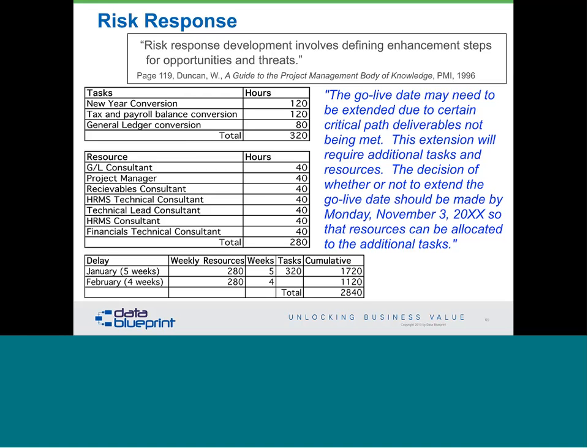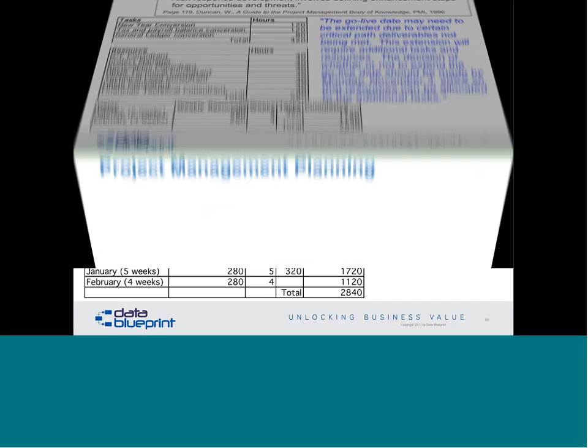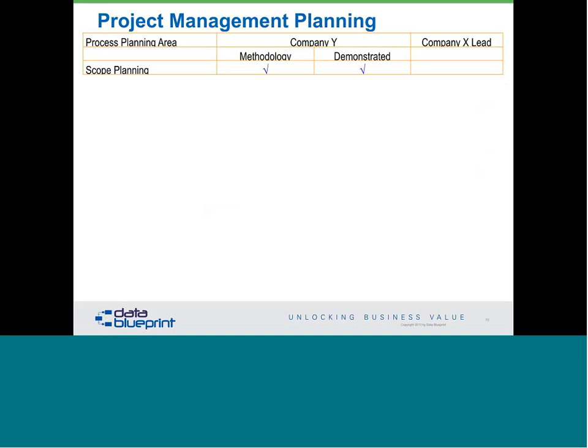So, bad for not following their process. But look at the penalty here. My goodness, instead of implementing the work on time with a total of 600 hours, as they showed in the original plan, if something went bad they would charge an additional 2,840 hours. So we get paid more if we mess it up, or if it doesn't work, than we get paid if it works perfectly the first time. Where's the incentive in that? Completely on the wrong side of the equation. We also had to demonstrate, because they did come back and say that we were not the project managers.